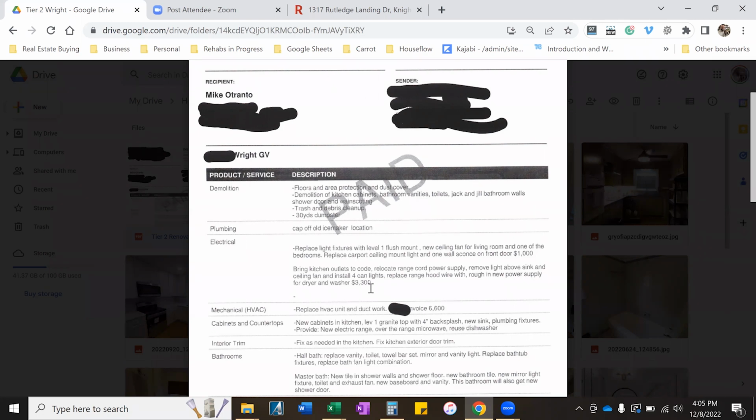Same thing with electrical. They have to demo those outlets and then they have to, quote, rough it in. Then when the new cabinetry is bought, delivered, assembled, hung, you have someone that will build the waste pipes and everything like that. And then after that's done, after the countertops are installed, then you have a trim out. So you have a rough in and a trim out.